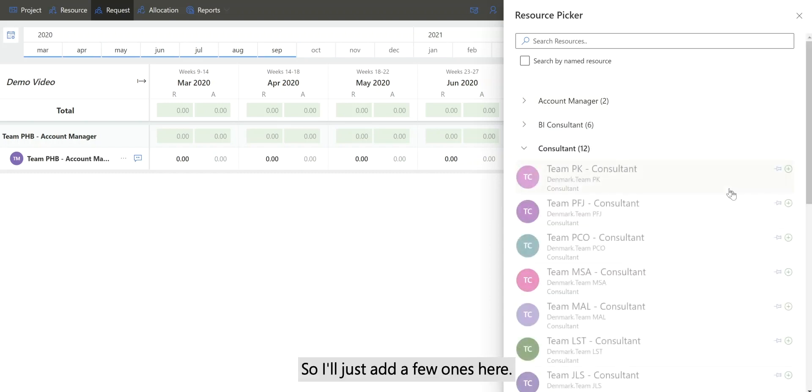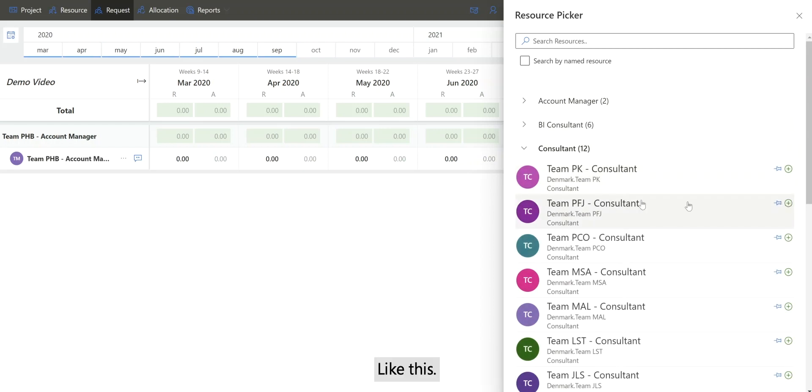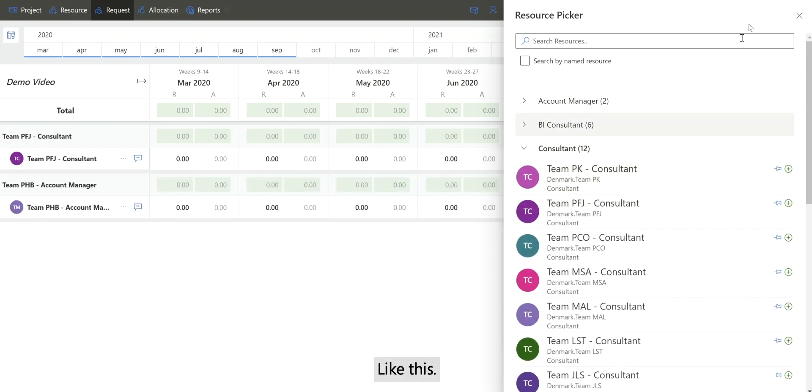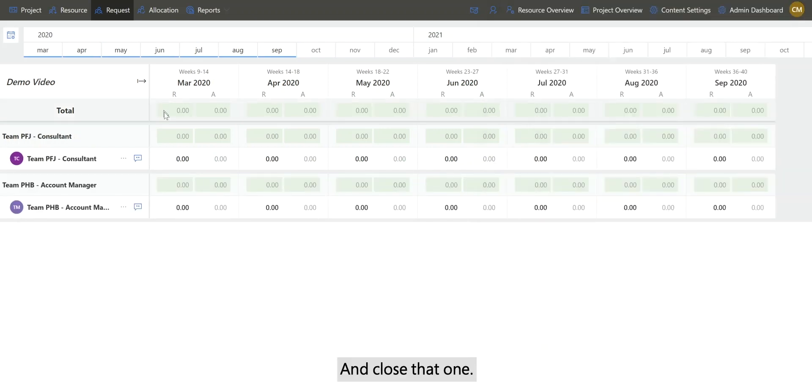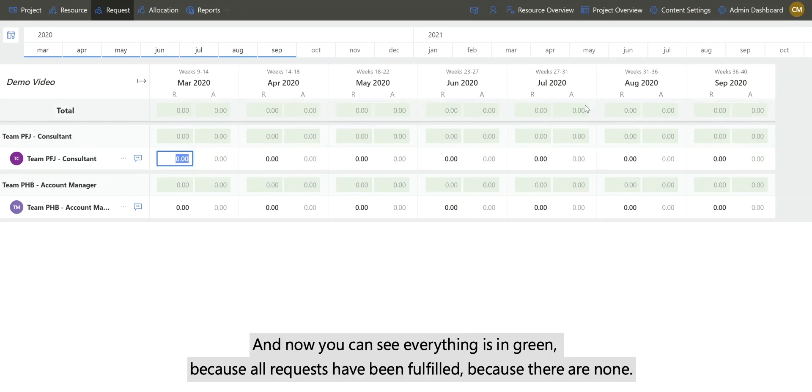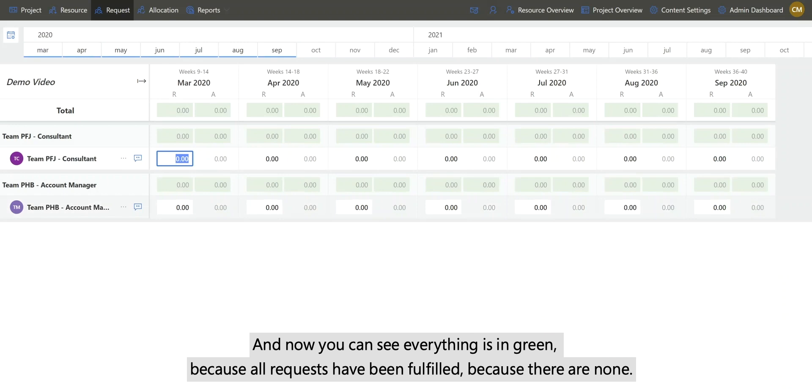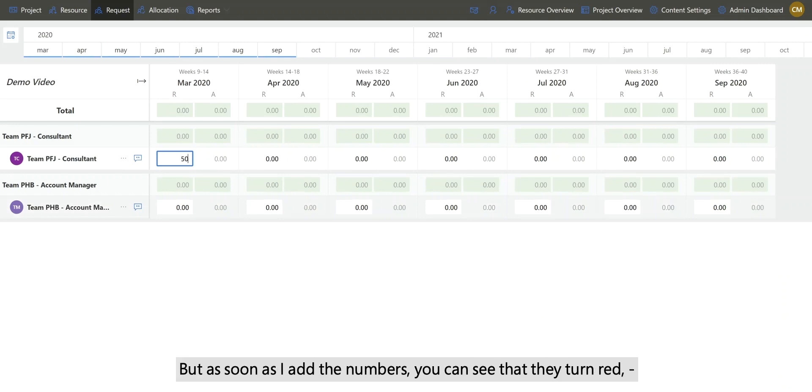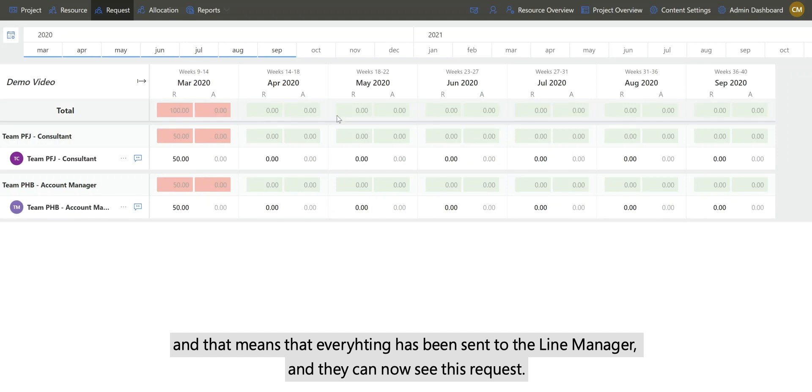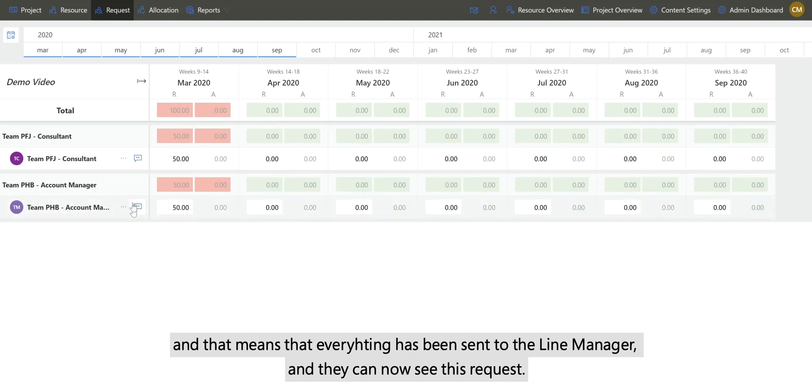So I'll just add a few ones here and close that. Now you can see everything is in green because all requests have been fulfilled because there are none. But as soon as I add the numbers, you can see that they turn red, and that means that everything has been sent to the line manager and they can now see this request.